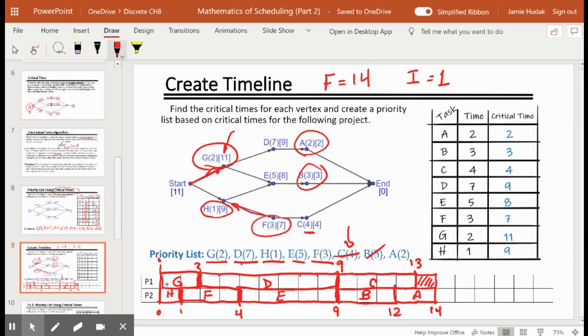We had to keep skipping over D until its prerequisites were met, but then we scheduled it as soon as possible, and we got all of the what's called the chain reaction of events scheduled to avoid a lot of time waiting and doing nothing where our processors are at idle. So we see it, we got a very efficient schedule here, and everything fit nicely.